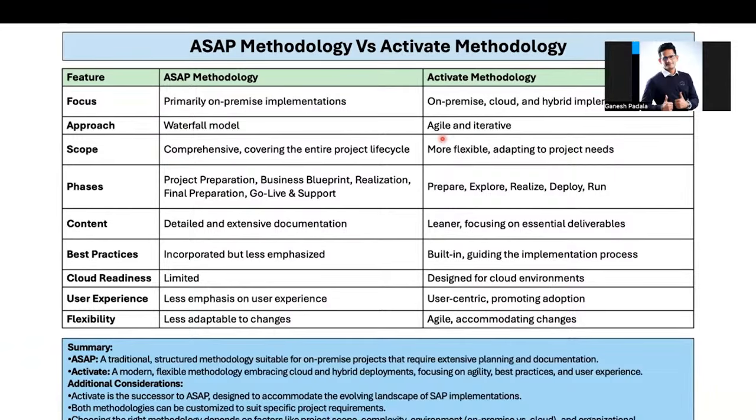So at a high level, it is about how we split the entire operations into phases. Or else, when you have 100 developments, even in waterfall we used to do that. 100 developments means, okay, P1 60, everything should go before go live, and some 25 go live to hypercare, within 2 months after the go live, and the remaining 25 or 10, whatever is pending, can be given within 6 months. So like that we also used to split. That was a more systematic way it happened in the agile methodology.